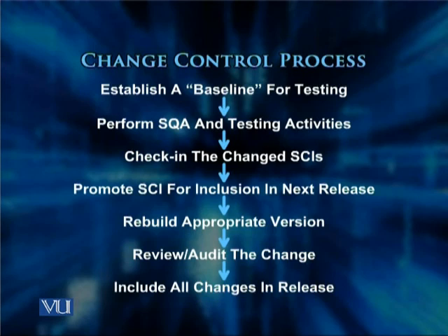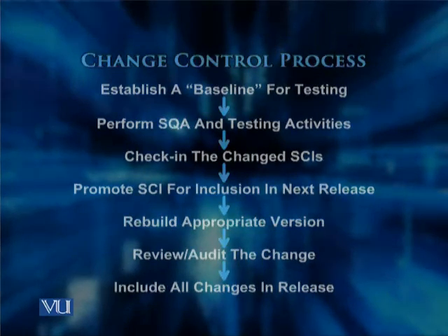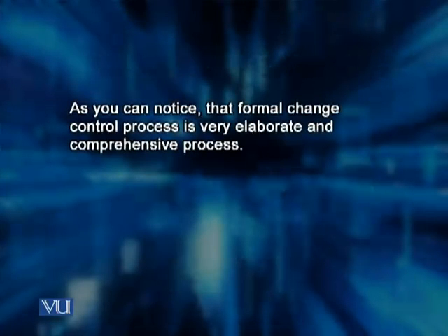The rest of the steps are like that. We rebuild the appropriate version, we review and audit the change, and we include all changes in the release. As you have noticed, I'm sure, the formal change control process is a very elaborate and comprehensive process.